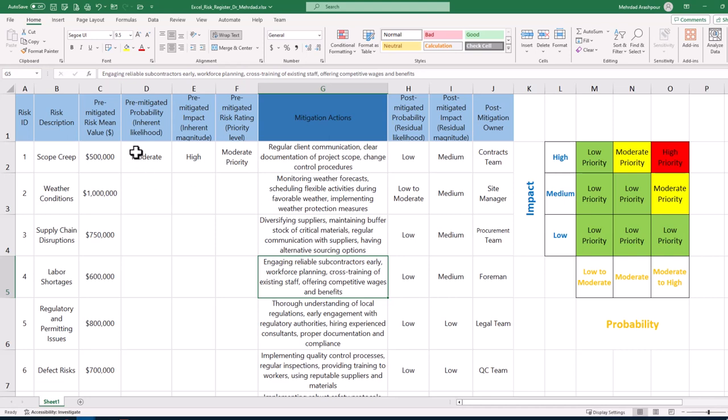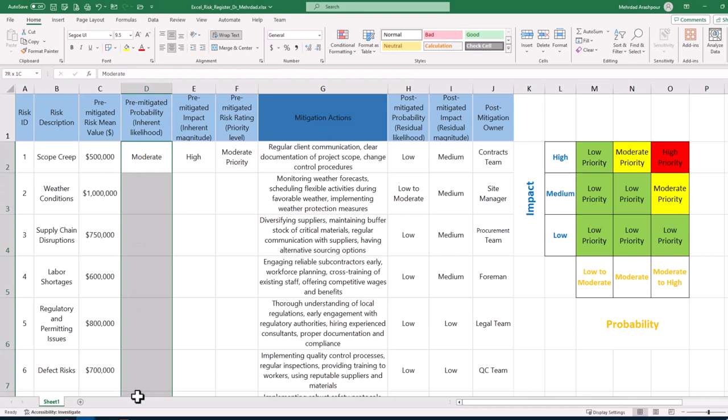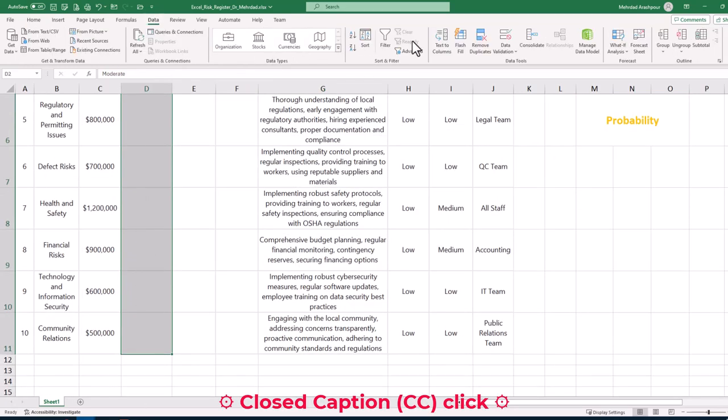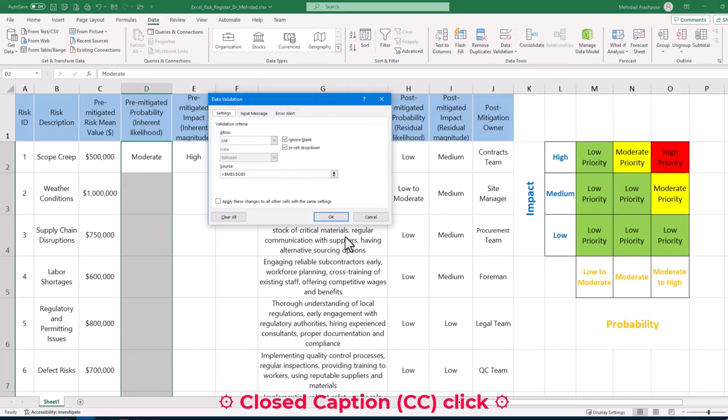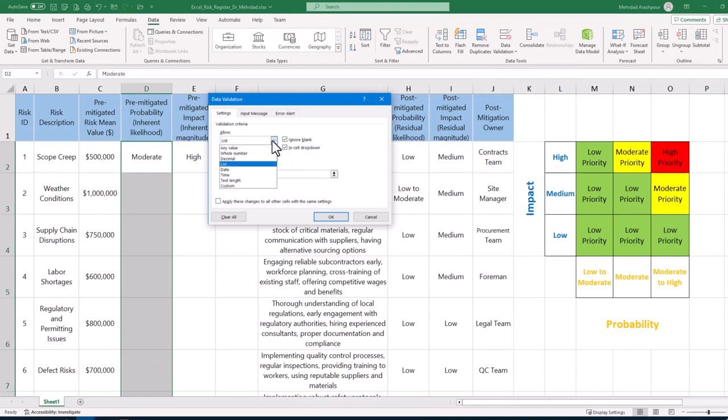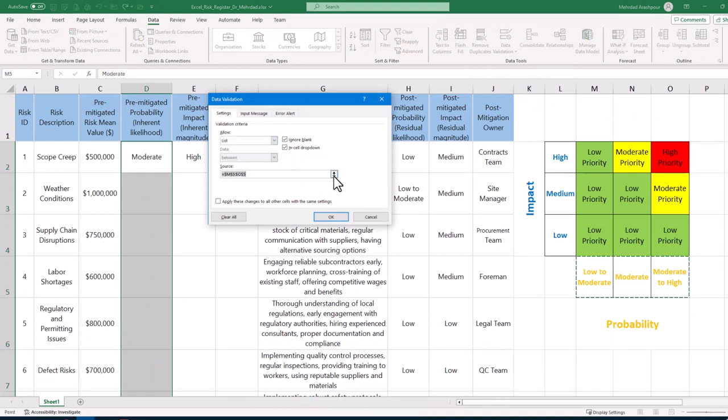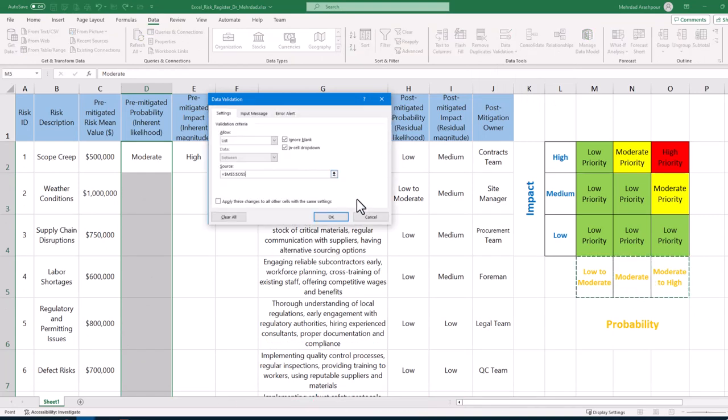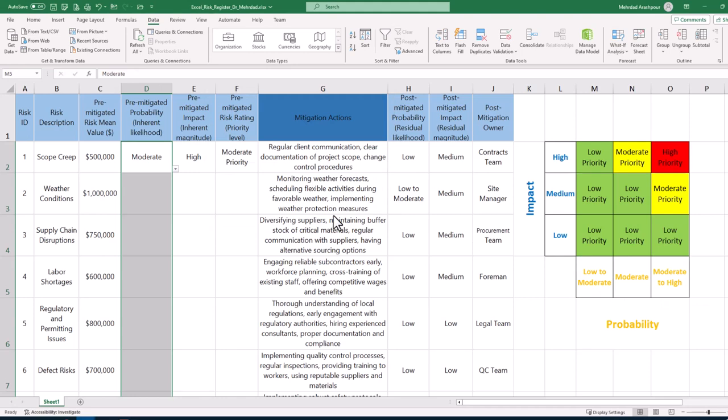First, we select the range of cells concerning inherent likelihood and from the data tab we click on data validation. Then under validation criteria select list. Finally, specify the data source by selecting our defined likelihood values on the project risk matrix.